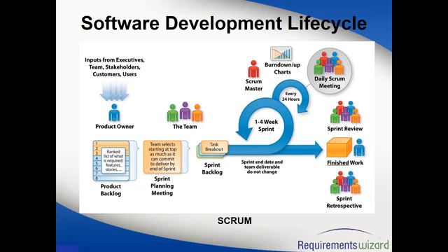So the sprint team has to make sure that they pick the stories which give value to the product owner. Suppose the sprint team decides and picks 6, 7, 8 and starts working on them. The product owner is not going to be happy, because it was never part of their priorities. It was always at the bottom of the list. The most important were 1, 2, 3 and then 4, 5, 6 and then 7, 8. So the sprint team will only pick the work where the priorities are set by the product owner.